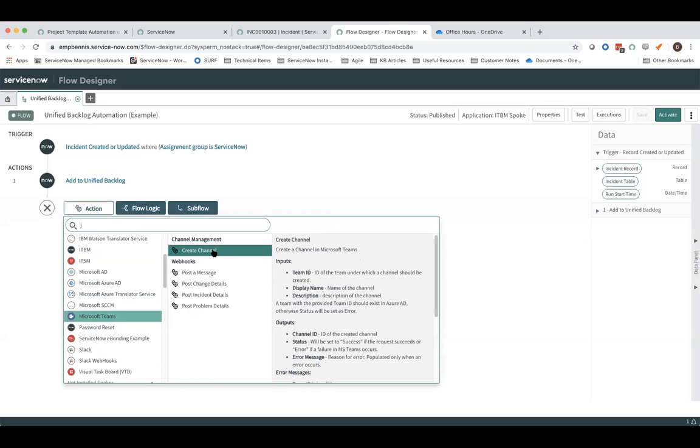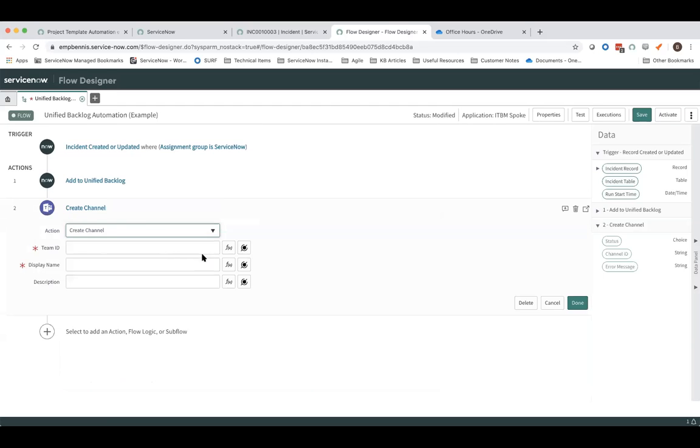And you could go ahead and say, anytime a project is created, I want to create a channel in Microsoft Teams for that project, for instance. That would be something you could do as well. You could even do that right in the same flow as put my baseline, put my project plan in there, and create a channel, and then populate a field on the project record with a link to the channel. You could do something like that automatically with Flow Designer. And that's just as simple as adding in these spokes here. Yeah. Okay. Sweet. Thank you.